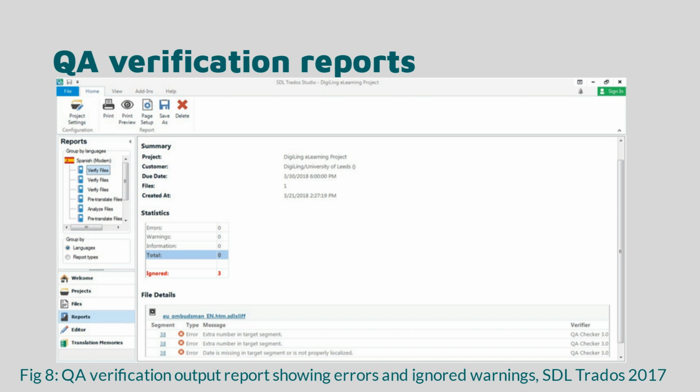provision of a translation service or for quality management, the agency may be asked to provide documentation to prove that quality systems were in place and adhered to during each stage of the project. In such cases, the creation of a verification report becomes essential to achieving full compliance with the project brief.